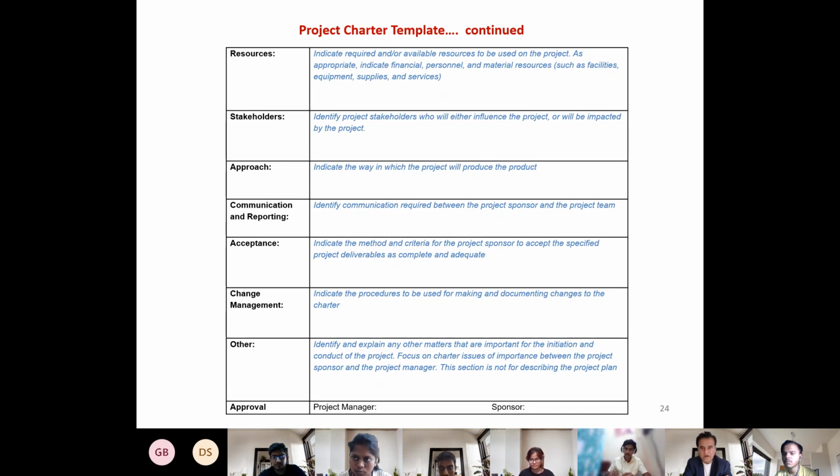Good. Very good. Excellent. So you will say overall, hey, project sponsor, we are going to give you regular reports. You will get a report every fortnight, and the report will include the project's progress. And by the way, if there's any incident or accident, we will also inform you of that. In addition, we will be open to you asking us for ad hoc reports, and we will give those reports to you as and when they are requested.